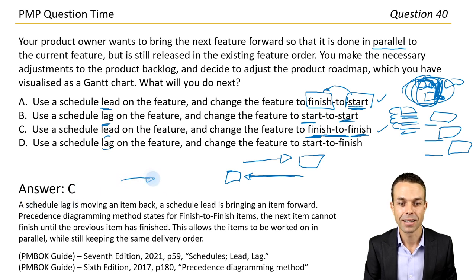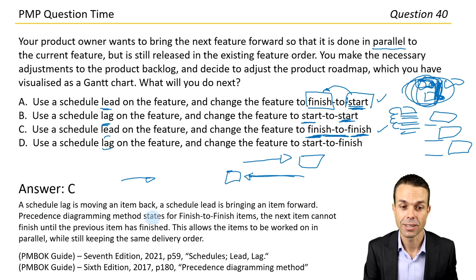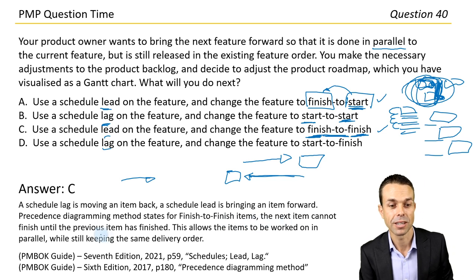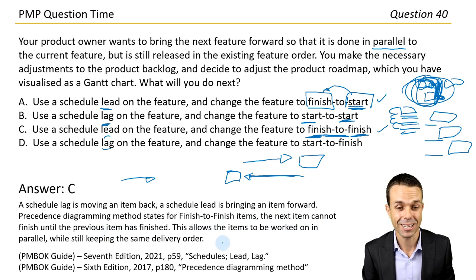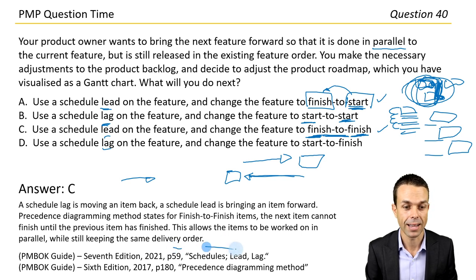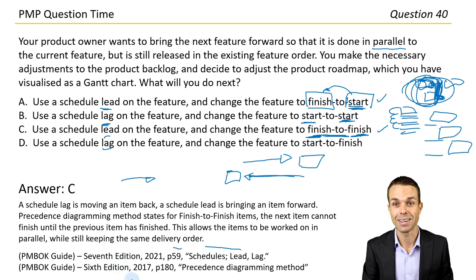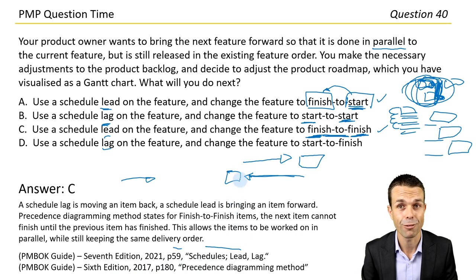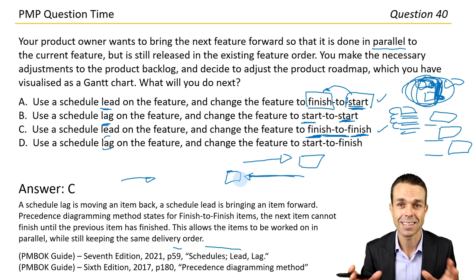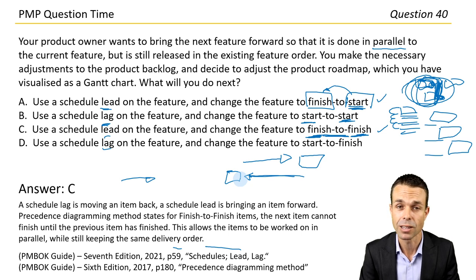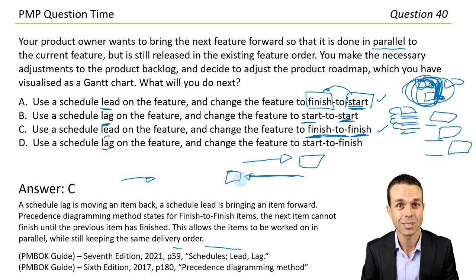Schedule lag is moving an item back. Schedule lead is bringing an item forward. The precedence diagramming method states for finish-to-finish items: the next item cannot finish until the previous item has finished — this allows items to be worked on in parallel while still keeping the same delivery order. Page 59 on schedule lead and lag, and page 180 on the precedence diagramming method in the PMBOK Guide. You and I have gotten through this section of PMP questions on the PMBOK Guide 7th edition. Keep practicing, keep learning a little bit every single day, and I know you can pass the PMP exam. I hope to see you in the next video.